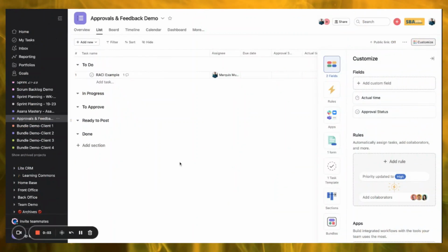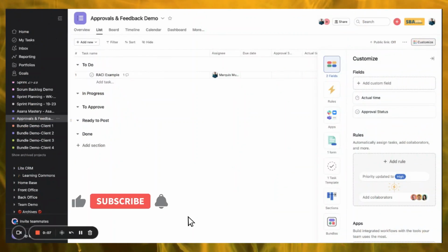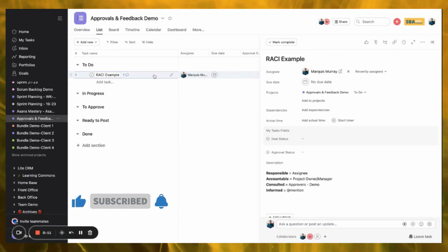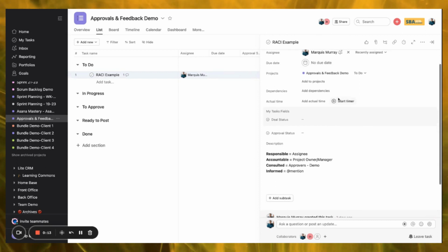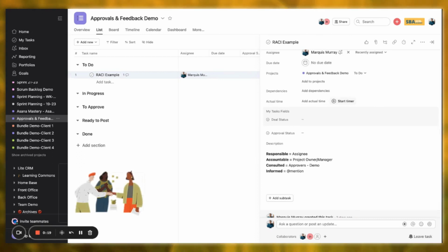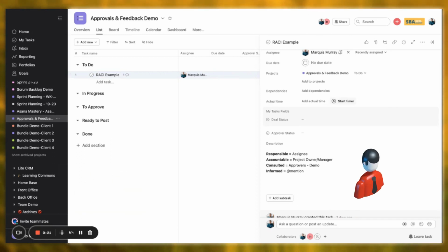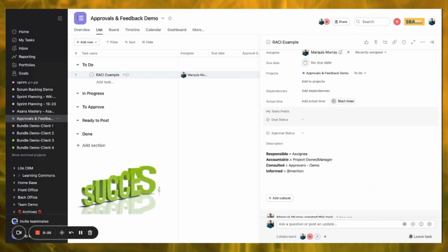In this video, I'm going to show you how to manage your approvals, requests, and your feedback inside of Asana following the RACI methodology. Now, RACI is an approach in project management that basically assigns responsibility and accountability to all the project stakeholders so that everyone knows who is doing what, by when, and who is ultimately responsible for the completion and success of this project.